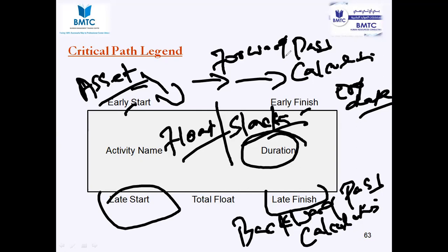Now you come and sign a cost reimbursable contract. That will favor the contractor, since the client doesn't know everything because the scope keeps evolving. So the complete task is given to the contractor. The contractor is going to develop the design and take approval. Based on the design, he works out the network diagram, how much work you have to do. He places the work in the network diagram, assigns the resources, and calculates how much time it will take to complete each and every task. The contractor develops the network diagram and shows it to the client. Since the contractor developed the network diagram, the contractor is going to take complete ownership of the float which they brought into the network diagram.